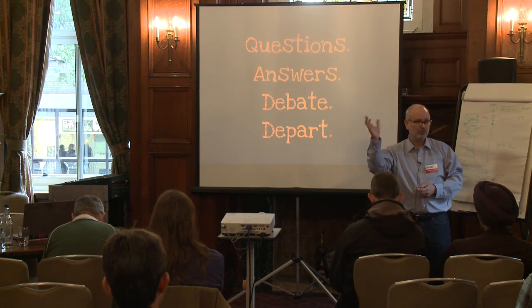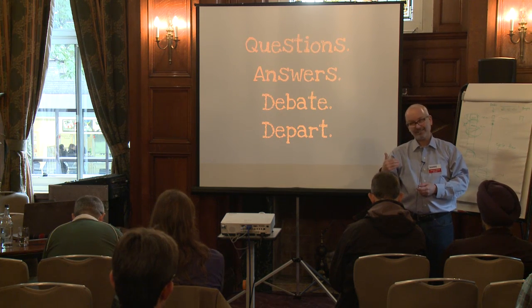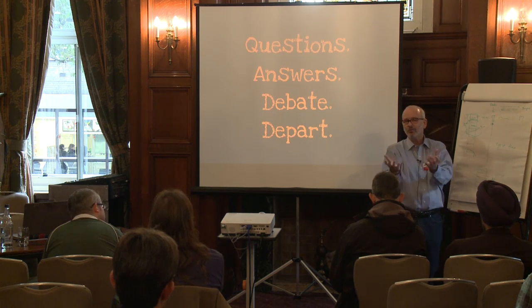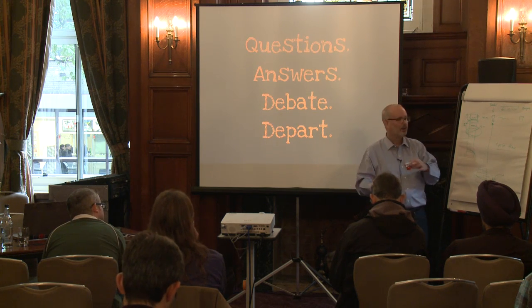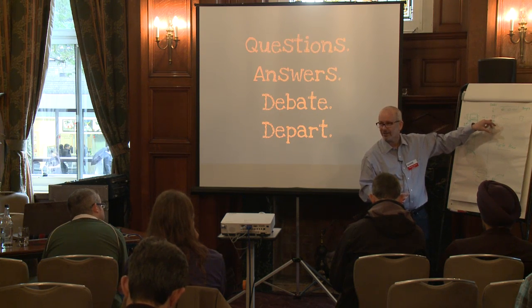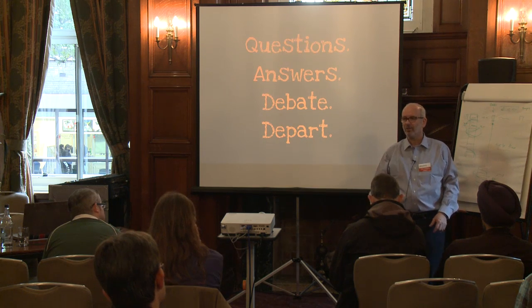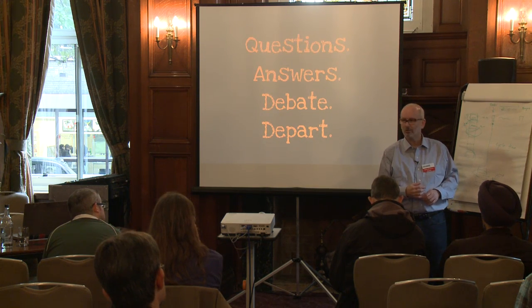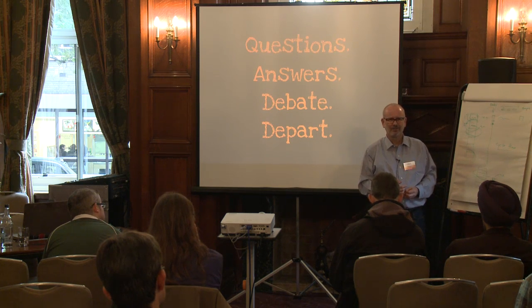And of course, if you're a Scrum person, that story that they were working on, they get a 0 if they didn't get it done in that iteration. And what you find from that is that we want more certainty, right? We want to make a commitment and keep it, which gets us to writing better work items that are more squad ready, so they don't get those 0s. And the variation in velocity doesn't occur, iteration over iteration. It's a great question. Does this make any sense to anybody?